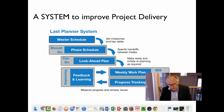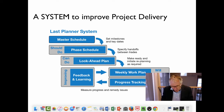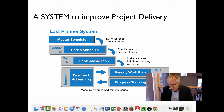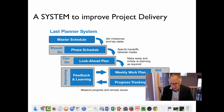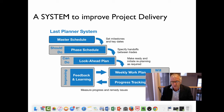How do we apply lean to building construction? In a study on workflow variability conducted by Ballard and Howell in 1998, they identified that there is a failure rate of 54% in achieving planned workflow. Workflow variability results in delays for trades waiting to do downstream work, creating stops and starts that greatly affect the team's ability to control workflow.